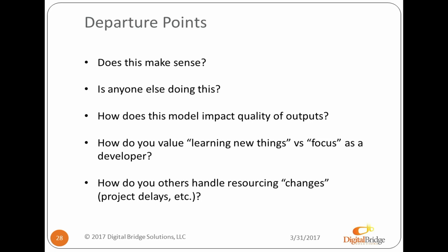Yeah, so Nicholas is part of the Digital Bridge team as well. So yes, we calibrate this constantly through post-mortem meetings after a project's done to say how did that go, what are the things that could have been done better, and there's opportunities during a project as well to see if it's just not working or somebody's spread across too thin, we can make adjustments in real time. And one of the implications of that is in those postmortems, you're going to have people who are part of multiple projects. So the learnings in those meetings are more broad than just the immediate project team, which is helpful.